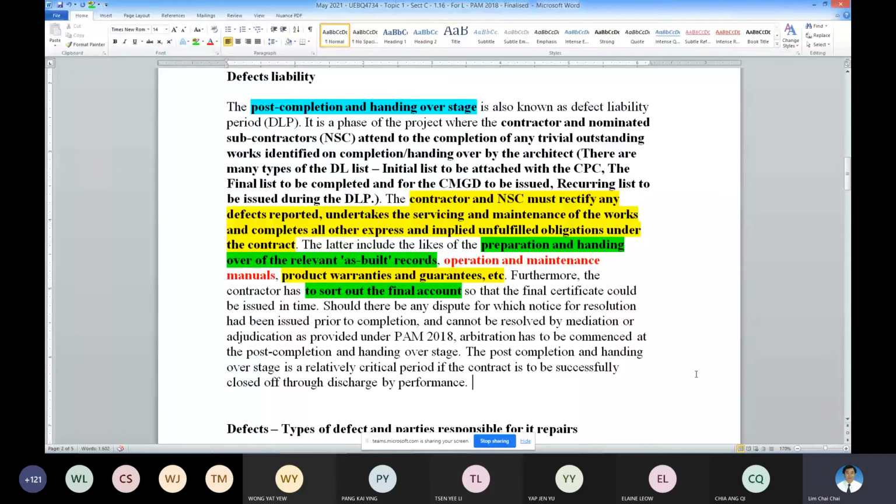So please be careful in future if you are working for the contractor. Make sure that you submit everything you are entitled to for payment, or whatever the architect and QS need to evaluate, within 6 months of the CPC. This is the so-called contractual time bar.